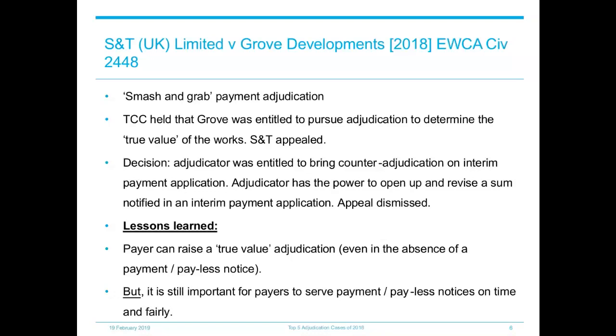Further, although adjudication proceedings are swift, there is still a risk of the payee becoming insolvent after the payer makes payment on the smash and grab claim and before the payer's counter-adjudication proceedings are concluded. The payer is therefore obliged to make payment with no guarantee that these funds will be recovered if they are successful in the counter-adjudication. This decision is therefore an incentive to payers to administer payments promptly and fairly. Therefore, whilst the threat and consequences of a smash and grab claim have been diminished, they remain a useful tool for payees to recover swift payment and a strong incentive for payers to improve how they administer payment processes.